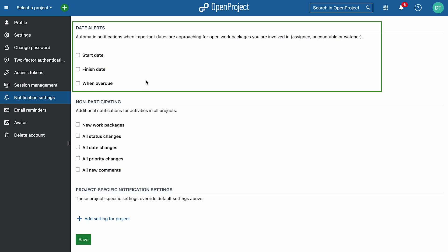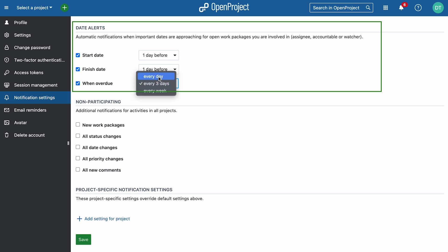As enterprise customers, you can enable date alerts for start dates, finish dates, and overdue tasks if you are involved as an assignee, accountable, or watcher.